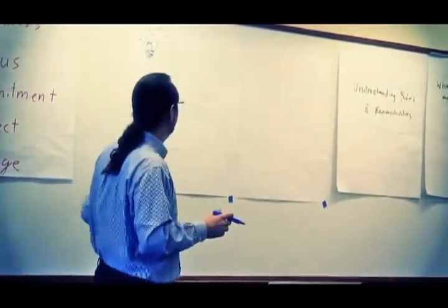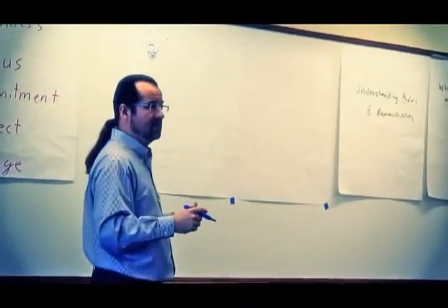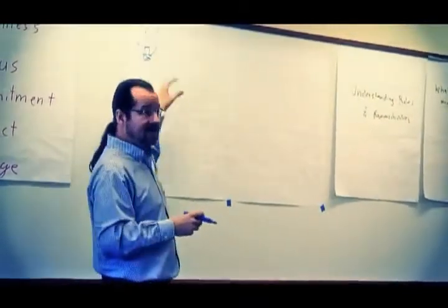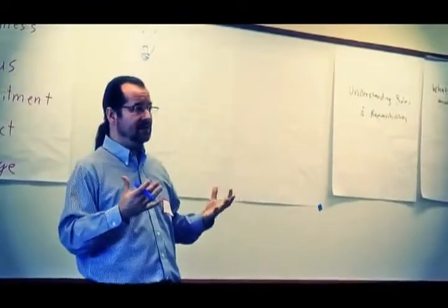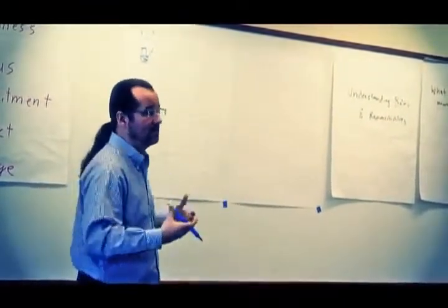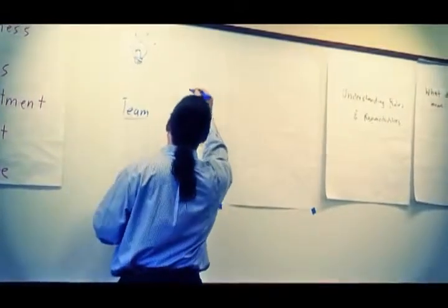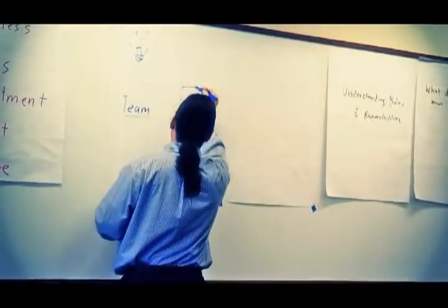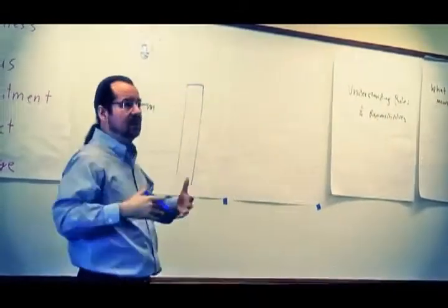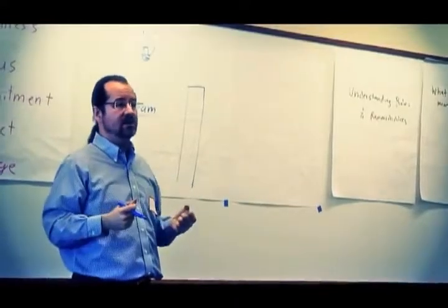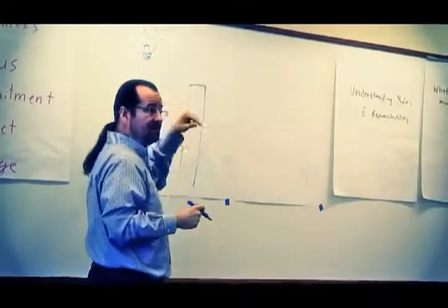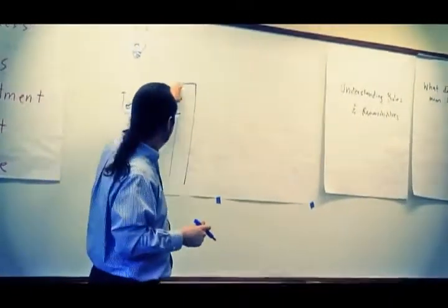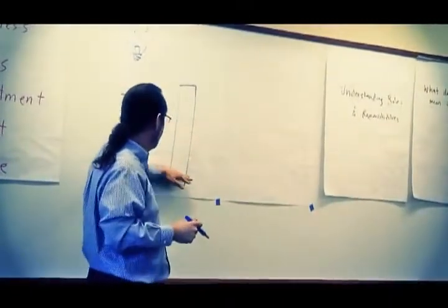So in order to begin doing Scrum, we need to take this idea and record it in ways that will make it actionable and implementable. And so I like to think of this as a big stack of our requirements or our objectives. Usually we call them user stories. Up here at the top, these are the ones that we're going to do first. And as you go down, these are the ones we'll do later, and these are the ones we're going to do last.